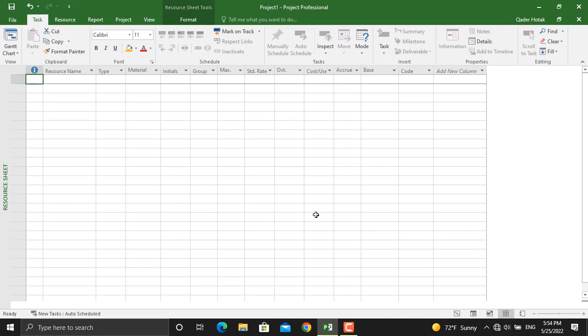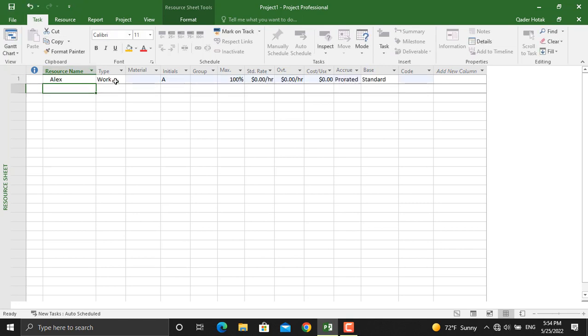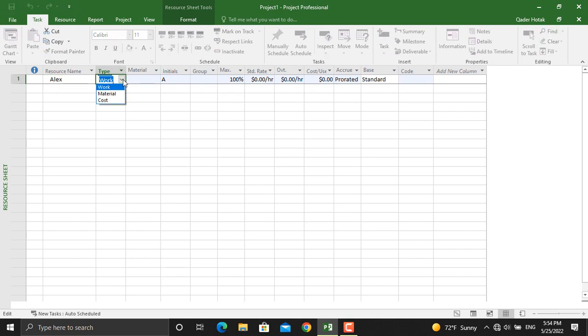Now we are going to assign different types of resources. These resources could be human resources, materials, and other types of resources that will result in cost for the project. The first thing you will write down is your resource name — for example, Alex, who will be a human resource. I'll write down Alex and select the type: is it Work, Material, or Cost? If we select Work, the project will take it as a human resource.